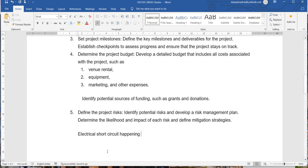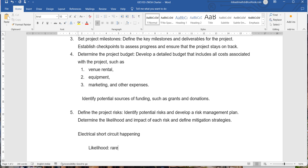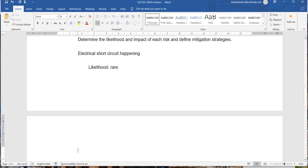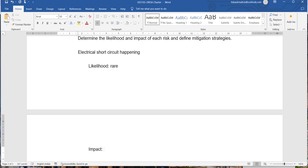In table form, you can write likelihood — meaning how frequently a risk might happen during the process of implementing the proposed project. You might say 'rare.' Then consider what kind of impact it will have on the project. For example, if a short circuit happens, everything could be damaged, creating a huge loss to the organization so the event cannot be conducted and invested money will be lost.